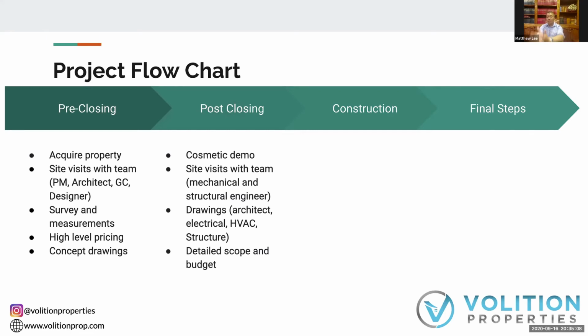So you don't actually know the full accurate price of your renovation until you've got all these drawing sets, because a general contractor needs to look at your layouts and say, okay, you want this open span, you want this additional window, you want underpinning, you want this staircase moved, you want all these things. That's, check mark, cost, adding all that up. Without a detailed list of things and the finishes that you're potentially looking at.